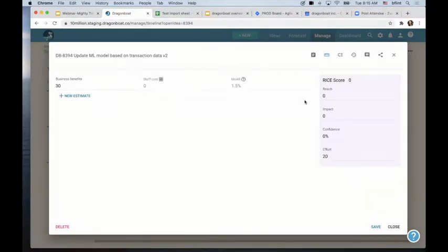Today in the meeting, someone asked, "Should I RICE score everything?" I said, well, typically you need a RICE score only when you have a tiebreaker. You cannot decide on whether we should work on feature A or feature B. At that time, you can say, hey, we want to do a RICE score. There are many ways to use it. You can look it up.